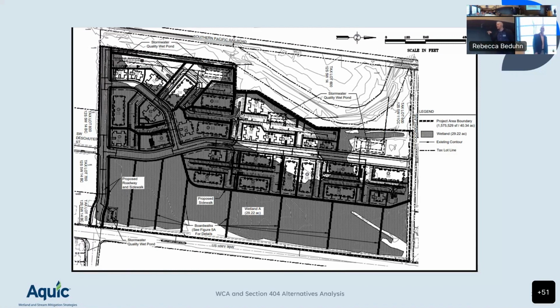Another variation of that question that I hear a lot is, we point out, well, what about that alternative, using that existing road through your neighbor's land as an alternative to get to your build site? Approach that landowner, they say no, get it in writing, put it in the application, that demonstrates that that alternative is not feasible.